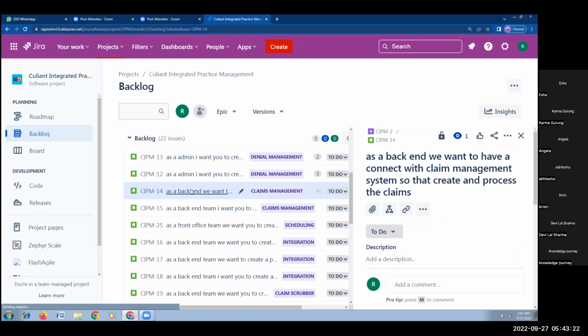And we try to see there must be a commonality among the team members for sure. Sometimes there won't be any commonality, right? So that happens sometimes. In that case, we will be providing the highest number given in the last few meetings. For example, in 3 to 4 rounds, whichever is the highest number we have taken into record, that will be given as the number here. So that's how generally the numbers will be given.